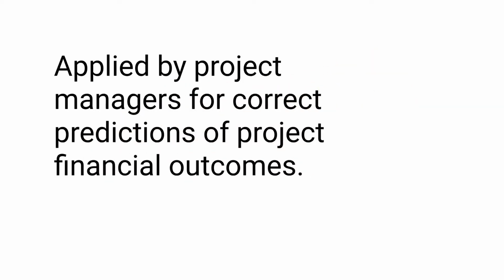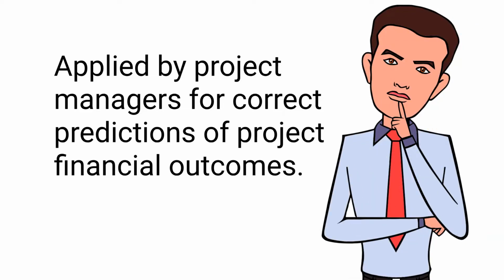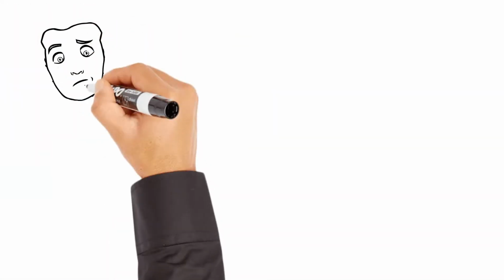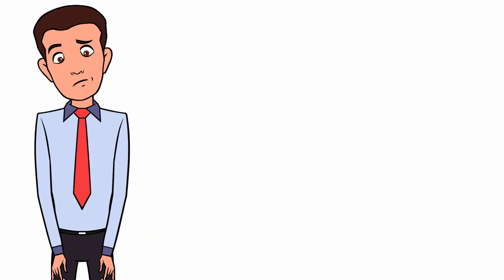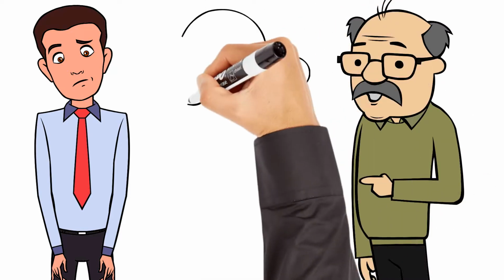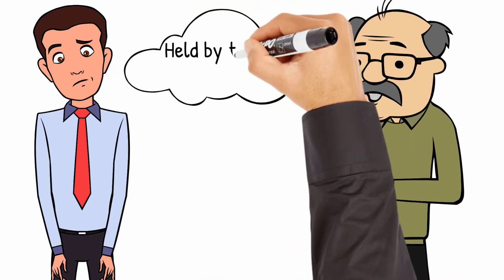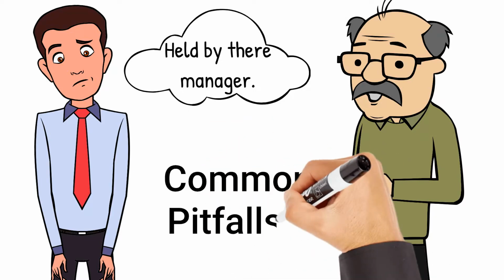Project cost forecasting is a process applied by project managers to help with correct predictions for project financial outcomes. However, project cost forecasting scares a lot of people. They don't know how much something will cost, but they know whatever value they give, they will be held to it by their manager. Factors that undermine cost forecast include poor raw data, or assuming that resources are 100% utilized. Following are some of the most common pitfalls for cost forecasting.